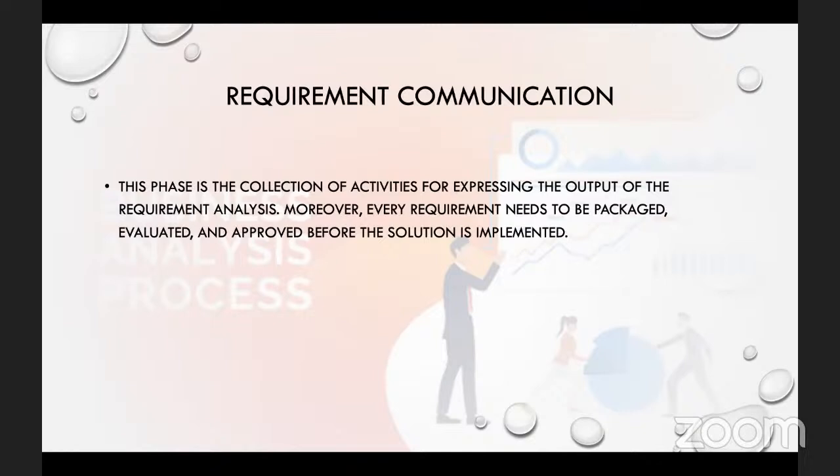You know, sometimes requirement gathering and requirement elicitation takes time. If it is a waterfall type of project, it's not agile. It can take about 90 days. It can even take more than that, 4 months, 5 months, 6 months. You're just talking to stakeholders and people, right? On unpacking and unraveling, a fact finding mission. You're on a fact finding mission, right?